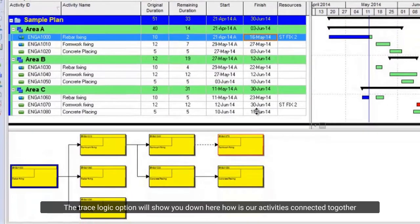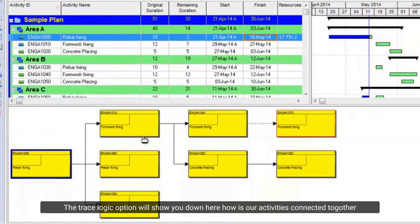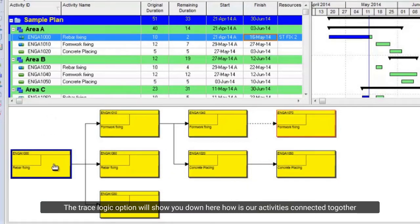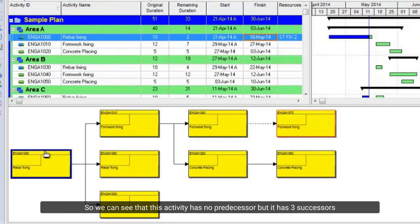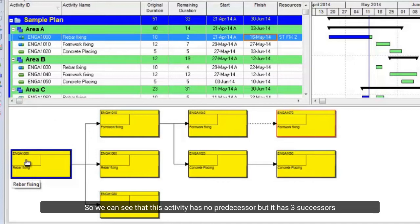The trace logic option will show you down here how our activities are connected together. So we can see that this activity has no predecessor, but it has three successors.